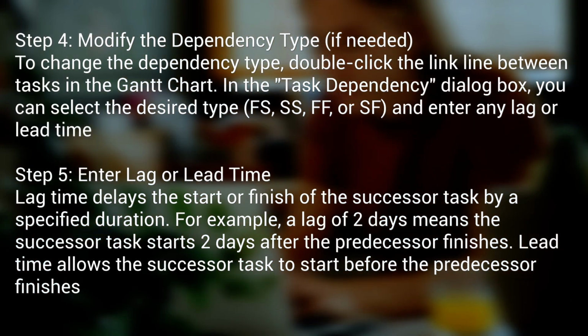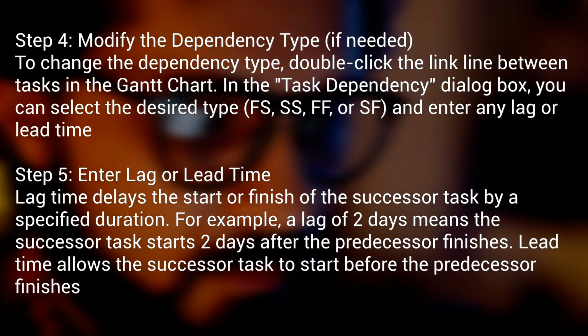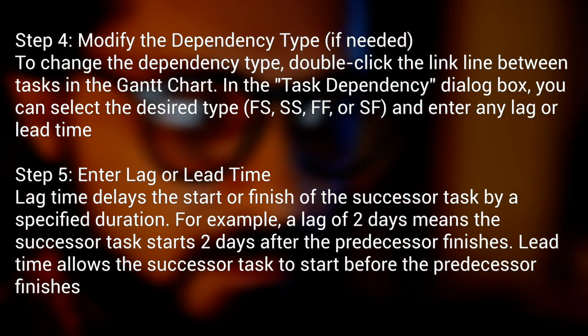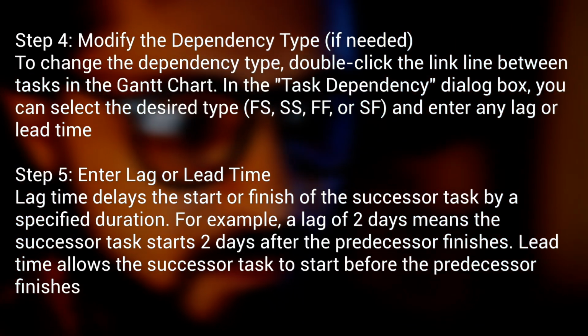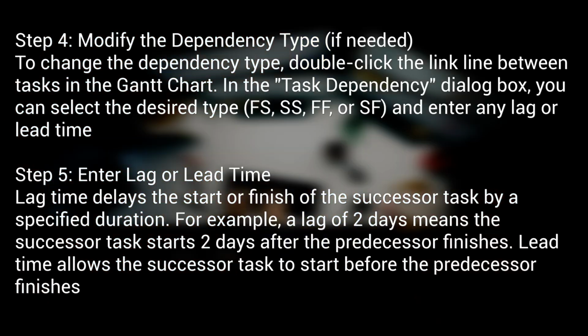Step 5. Enter lag or lead time. Lag time delays the start or finish of the successor task by a specified duration. For example, a lag of 2 days means the successor task starts 2 days after the predecessor finishes. Lead time allows the successor task to start before the predecessor finishes.